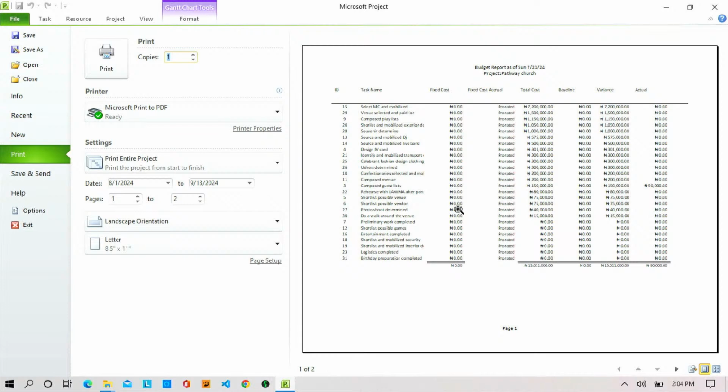Now, if your adjustment does not alter your schedule, no need to change the baseline. But if the schedule is now adjusted, let's say for example, an activity that was 50 days is now suddenly 70 days, your schedule has changed. So once you make it 70 days, you have to baseline it.